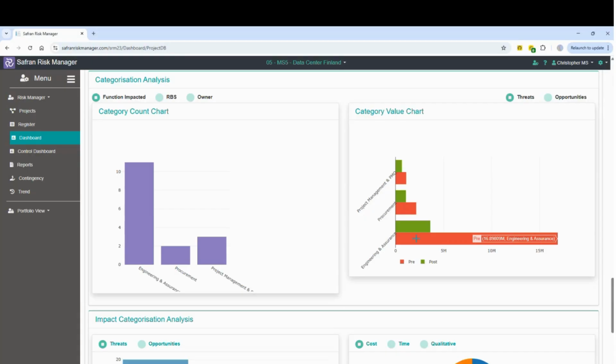Now, in my experience, a number of times when I've done an assessment of projects, what I've seen is very few material risks, like procurement risks, within the register. However, when you looked at the financial impacts of those few risks, what you'll see is they have a significant bearing on the project. So that disconnect between the number of risks and the financial impact that those risks are having should be another alarm for us to ask the right question.